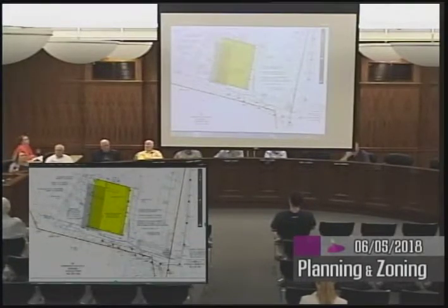So generally, as far as the schedule, I had mentioned we're trying to get this installed under the current DEP permit, so we're trying to expedite the project this summer and get it built this fall. In addition to the permit, there are safety concerns for personnel. You can see the structure is very old and it's been structurally supported just to keep it from falling down. So we're definitely in need of a structure like this.